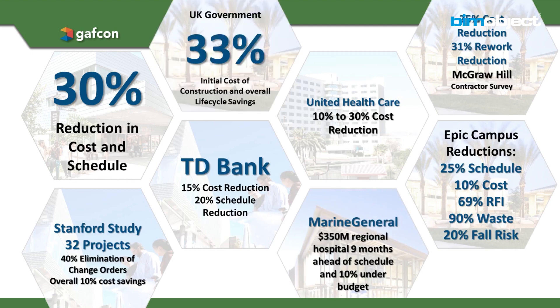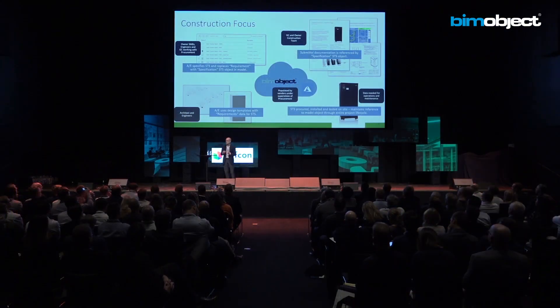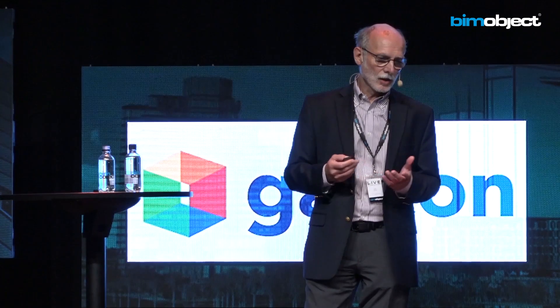Within the construction process, our focus is on the data. We have to approve the specification of every piece of equipment, and we also have to produce something called a submittal, which is all the associated documentation. Normally, this is a very manual process, and we believe that the use of BIM object will completely eliminate all the manual elements of this process.